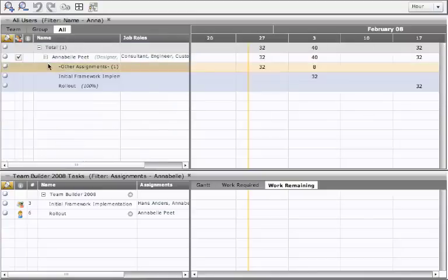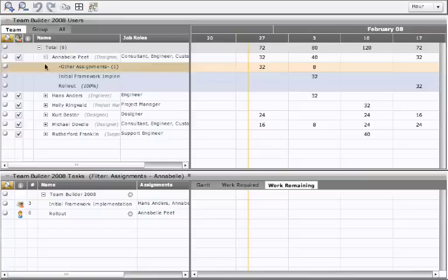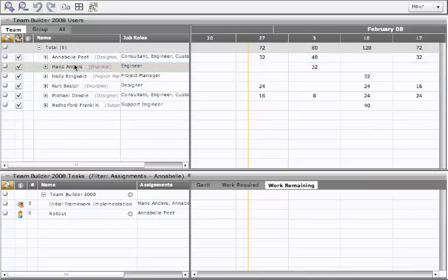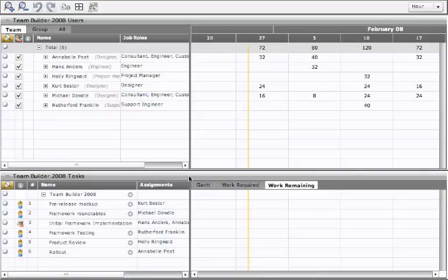And it looks like she is assigned to a task on another project that requires some time during the end of January and the beginning of February, but since it doesn't cause any overtime for her, she should be able to perform her tasks on that project as well as on my project. If I go back and look at the team list, I can see that I've got a team of 6 users built out, each one with team user roles, and each one assigned to tasks which they will be able to complete without causing any overages in their current schedule.